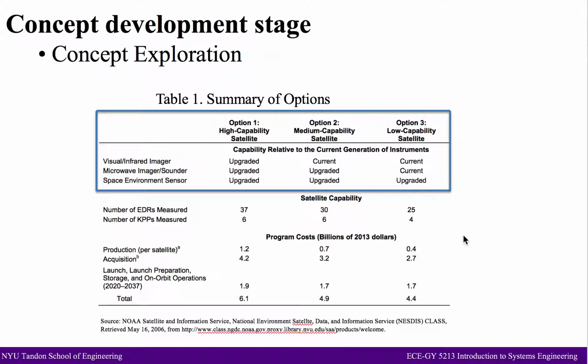So the IPO also explored other possible alternative approaches for designing the earlier model of the Endpoints system, which may cost varying amounts. One is, for example, delaying the start of Endpoints development to reduce the near-term cost, and another is fielding sensors on several smaller satellites rather than on a single satellite, or not replacing the POES and DMSP satellites.